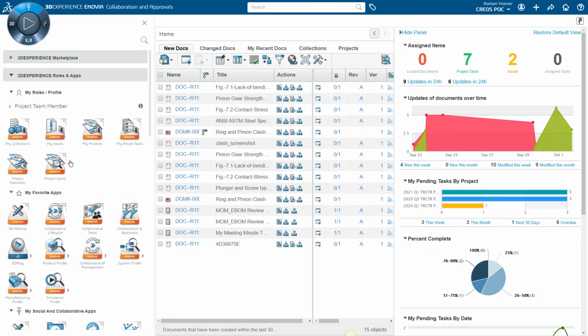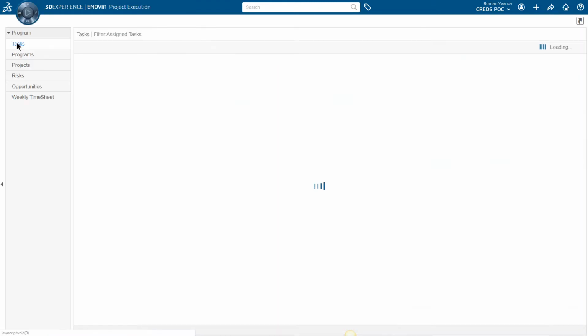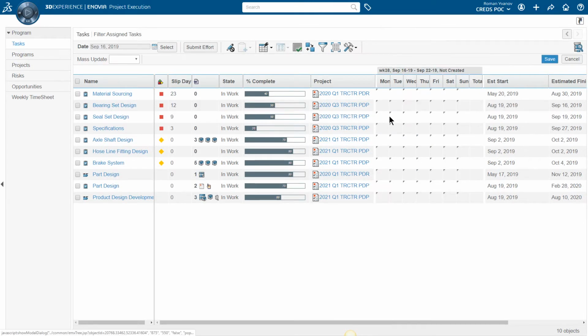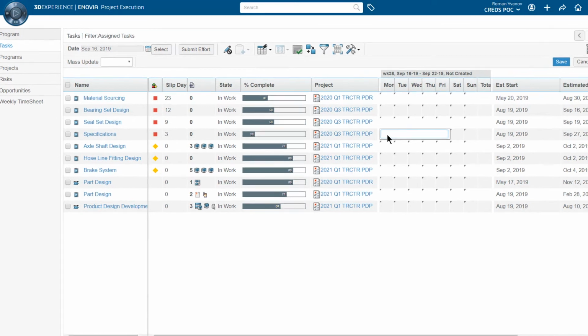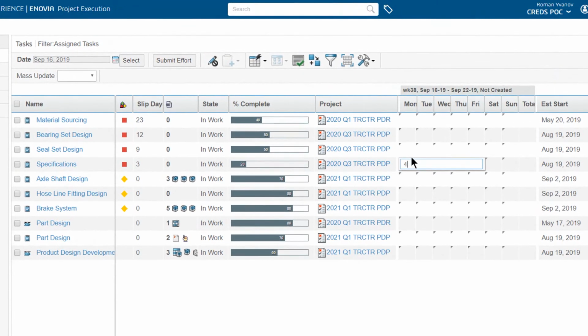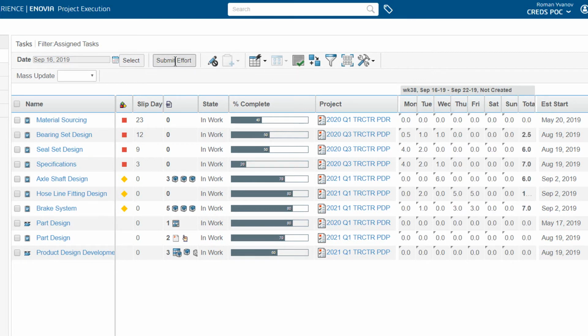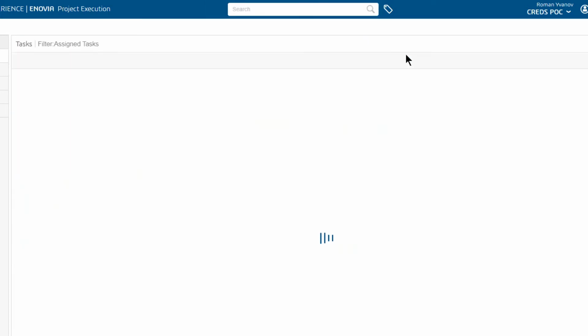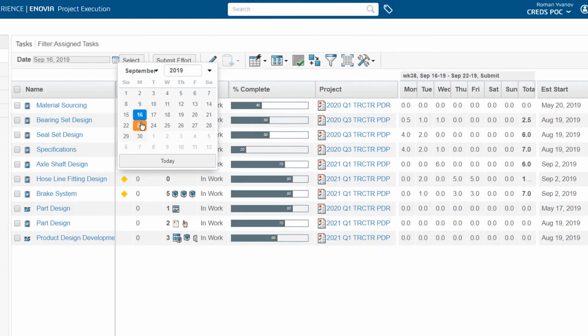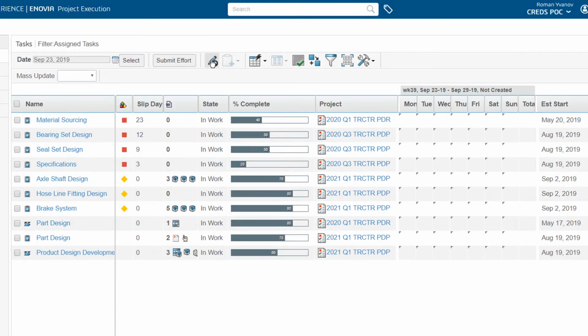The third way to manage resources is with timesheets. Notice how Roman enters his effort. Timesheets are critical for the project manager to compare planned versus actual effort and resource budget costs. Roman fills out timesheets for 3 weeks. He adds the effort on all his project tasks.